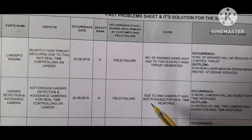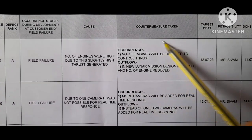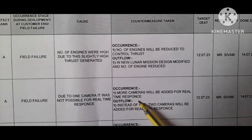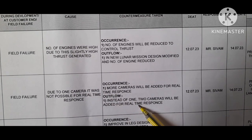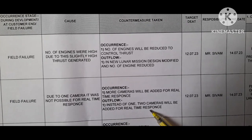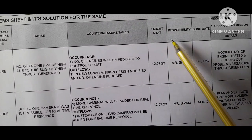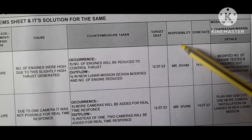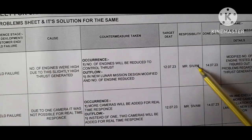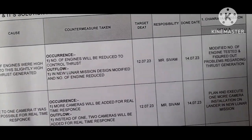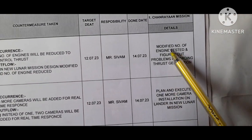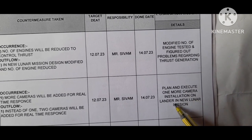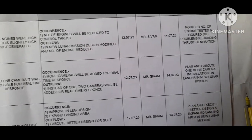Counter measure taken: more cameras will be added for real-time response. Outflow: instead of one camera, two cameras will be added. Target date, responsible person name, and done date are also given here. The responsible person is whoever is accountable for this problem and its avoidance. Details: plan and execute installation of one more camera on the lander in the new lunar mission.